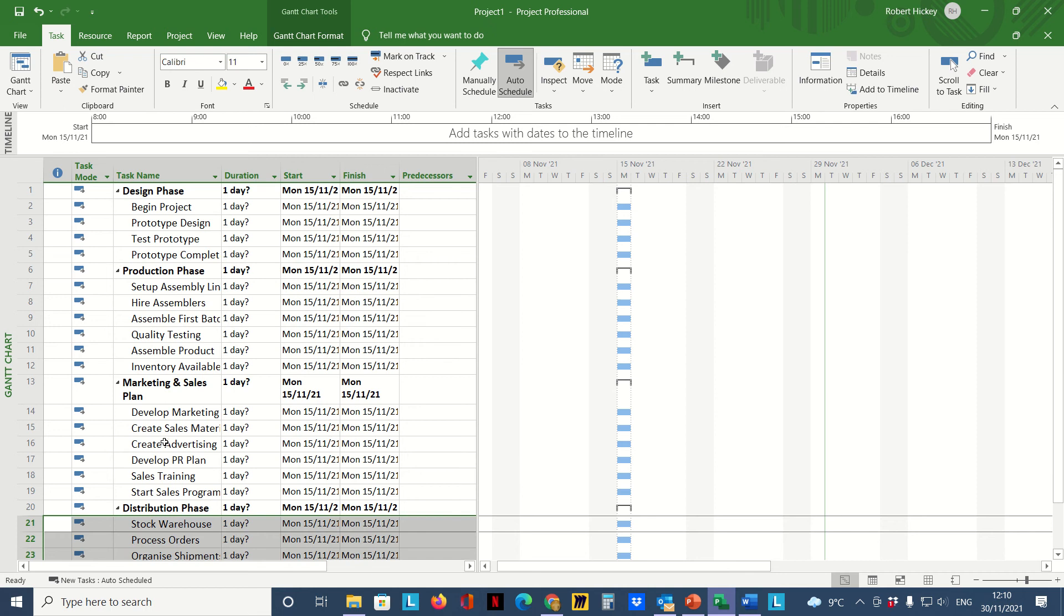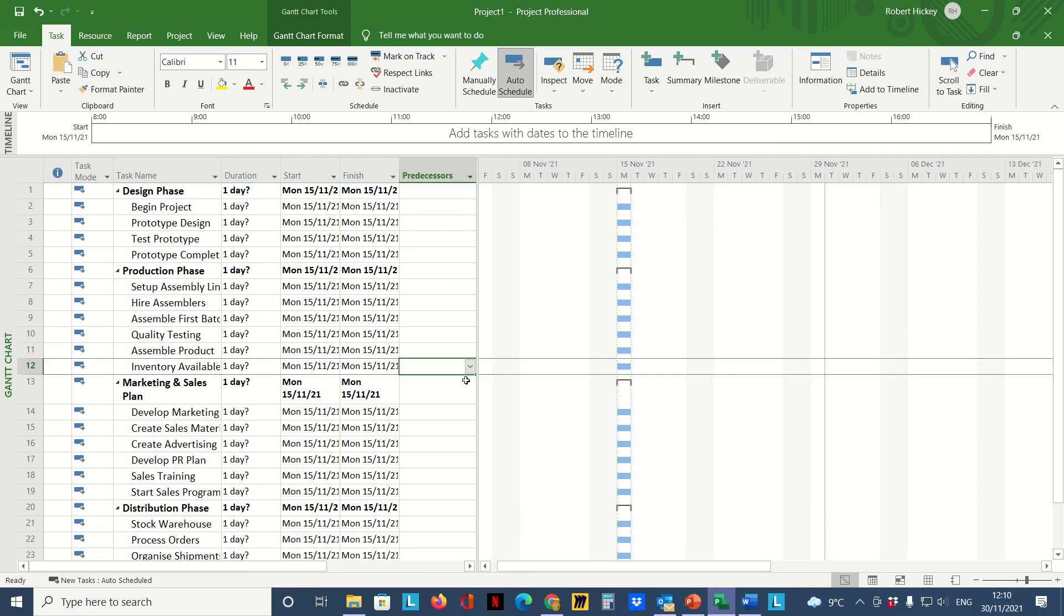Now what I'm going to do next is link these tasks. I'm just going to make an assumption here for this demonstration: I'm just going to assume that all of these tasks are linked together with a finish-to-start relationship.